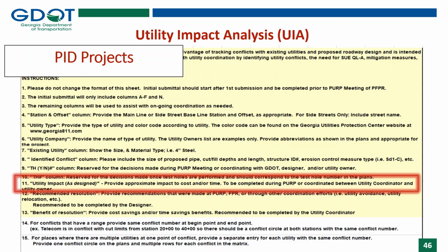The estimated cost can come from RS Means Cost Data Book, and that book is called the 2022 Heavy Construction Cost Book. It can come from an ACEC Designer Utilities Training, because it has utility costs in there. Or some people may contact the district utilities office because they have some utility costs as well that can be provided.